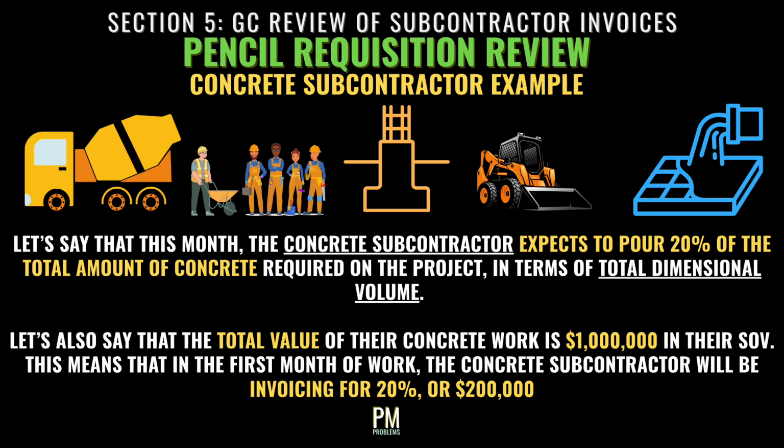In real life, the amounts that are charged may be more complex, and a subcontractor might charge for multiple items with varying percentages of completion for each respective item. The important thing to know is that the estimated value of the work is often based on percentage completed, and the GC must agree to it based on what's actually done before the client is invoiced.